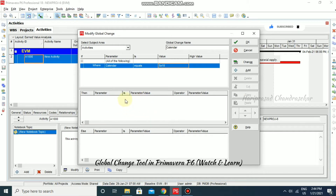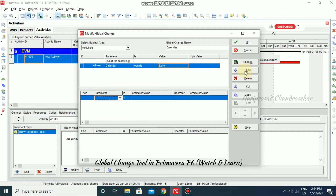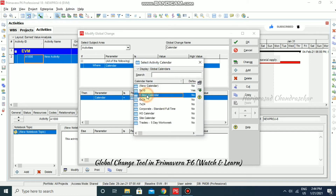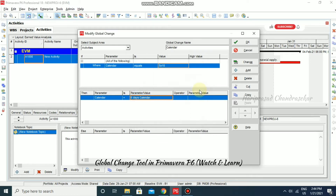Then click on the Then button. In this work area, click the cursor and go for Add. After adding, set the parameter — as usual, Calendar — and I'm going to set the parameter value to the Six Days Calendar. So if any activity contains a Five Cross Ten calendar, we can change that to the Six Days calendar.